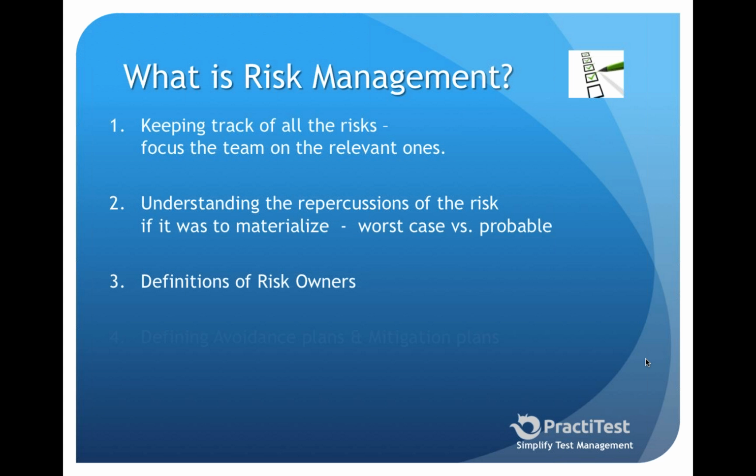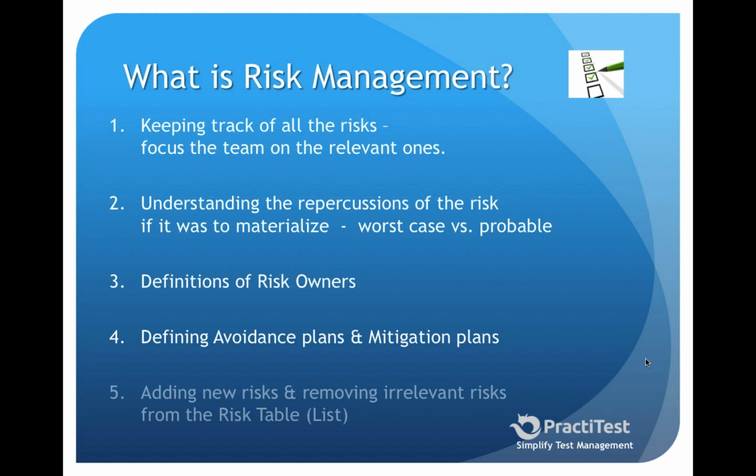Obviously, if we're talking about avoidance and mitigation, then you need to have an avoidance plan and a mitigation plan. An avoidance plan is going to be, let's take the example we did, it's a new technology, we don't really know what's in there. So an avoidance plan might be to take one or two people in the team and send them to an intensive course on how that works and make sure that those people are going to be able to, first of all, understand if the schedules are okay and pass along that information. That might be an avoidance plan. And a mitigation plan might be to have a company that knows that technology and can hop into the team and help us out by having more people who know that part of the technology in the team if need be. Okay, so you need to have both types of plans in place, obviously.